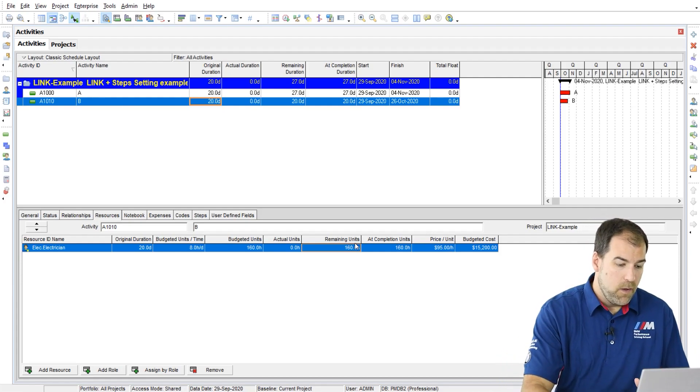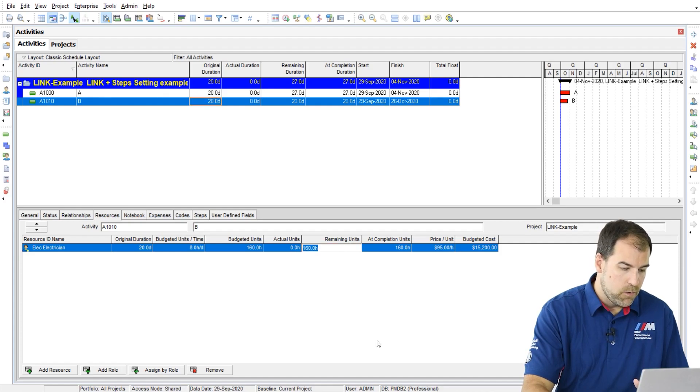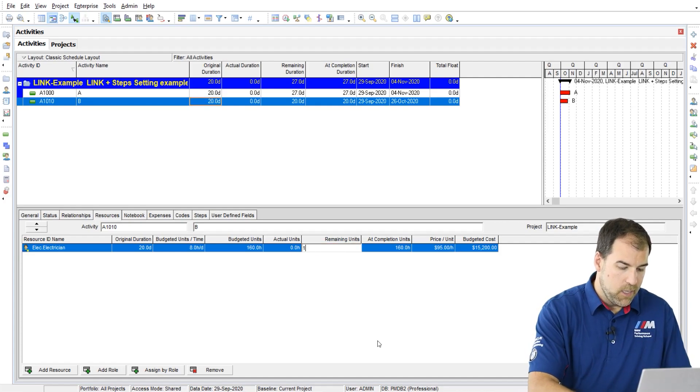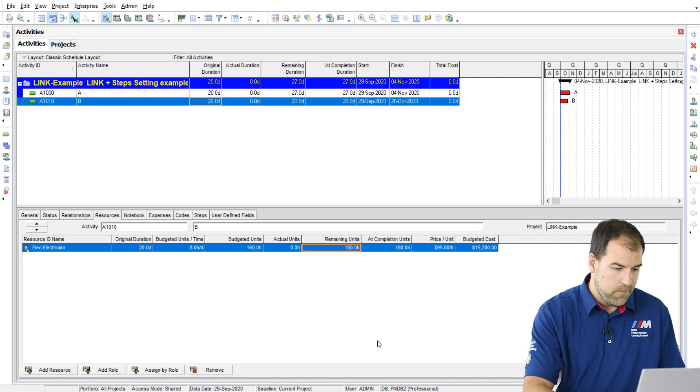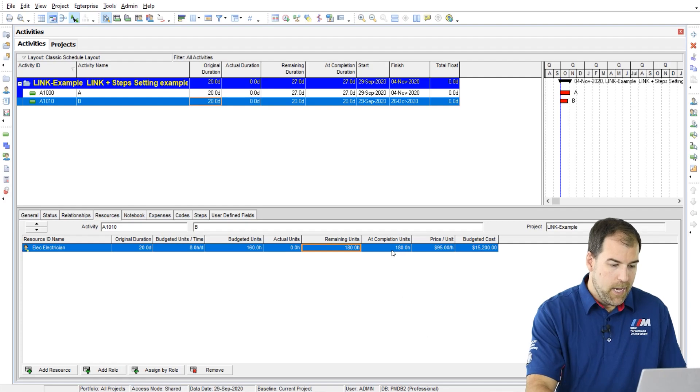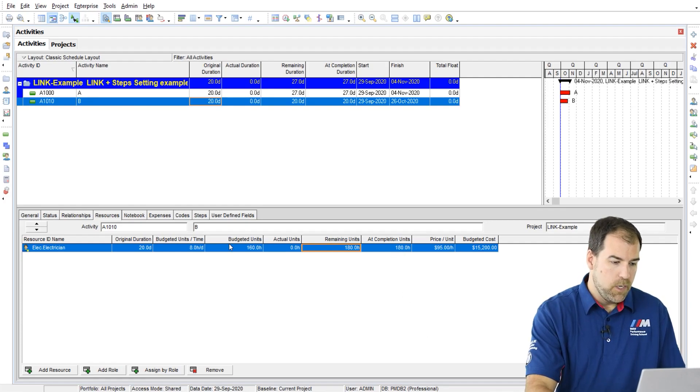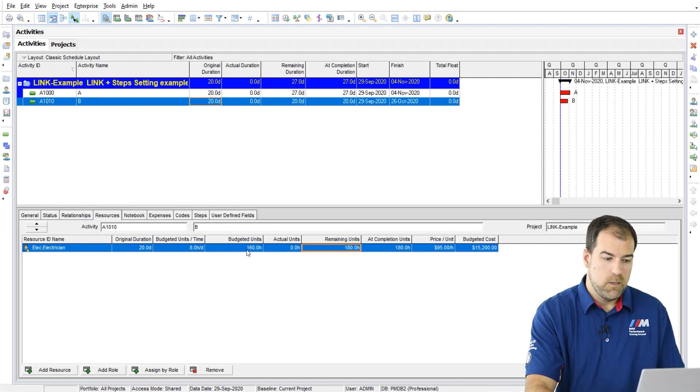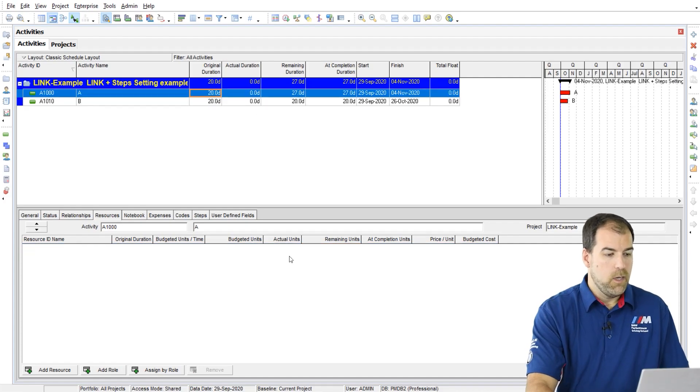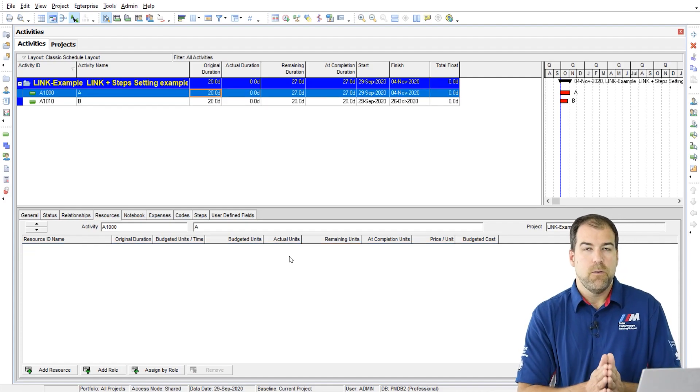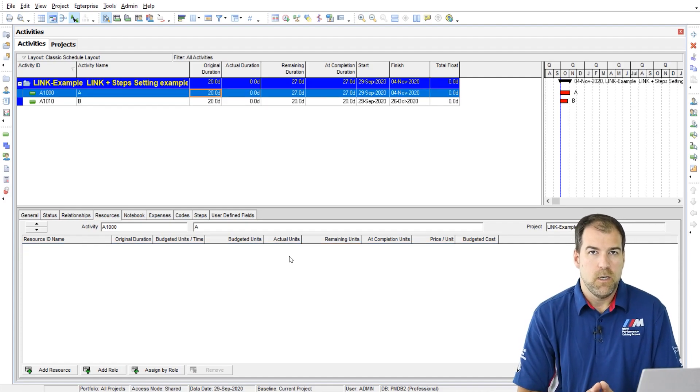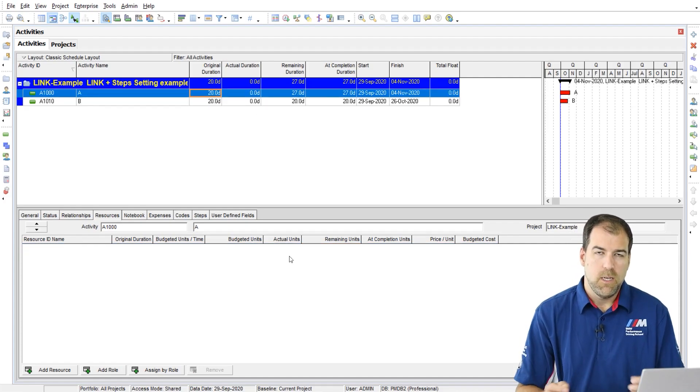And now they are uncoupled here as well. So if I edit this to say 180, at completion units gets updated, but budget units doesn't. Okay, so that's what that setting does is it unlinks it.